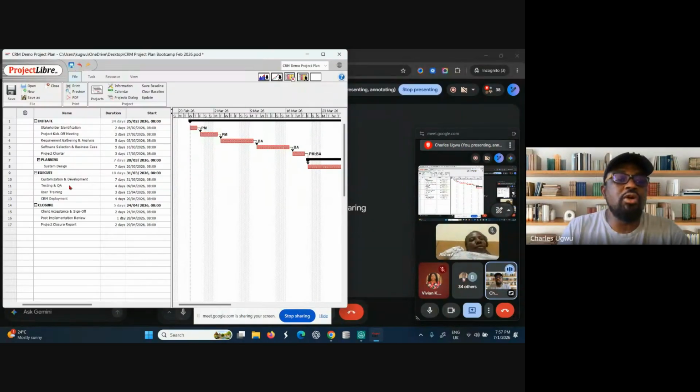And for instance, if we come here and insert project risk management, you find out that the project charter and the RAID meeting can start simultaneously without depending on each other. So this is where we can have this kind of activities.